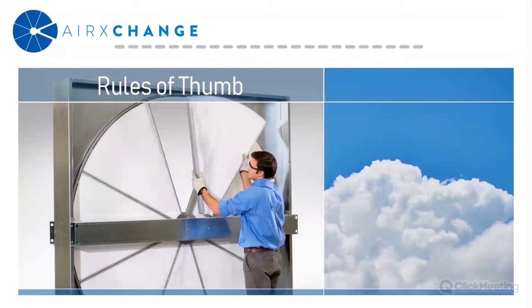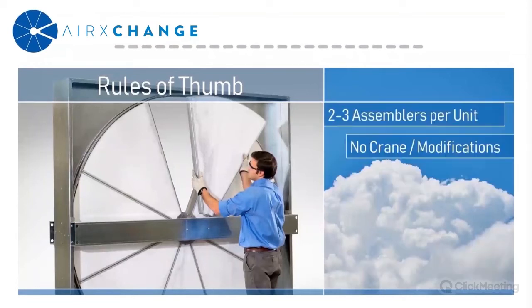So some typical rules of thumb when planning for replacement energy recovery components. For the majority of the projects, we recommend having 2 to 3 people available for the removal and assembly. In most cases, we find that adding more people doesn't usually cut down on the labor or time, and that's because of the tight space constraints of the cabinet. You can only really fit so many people into some of these small spaces.